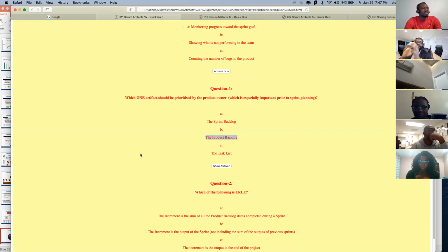made of items that are coming from the product backlog that are managed by the product owner, right? The product owner is the one who owns the product backlog. And I told you the other day that no one is modifying or adding things to the product backlog without the approval and the knowledge of the product owner. That's the only artifact that he's the owner of and the manager of, okay? So the artifact that should be prioritized by the product owner is the product backlog.